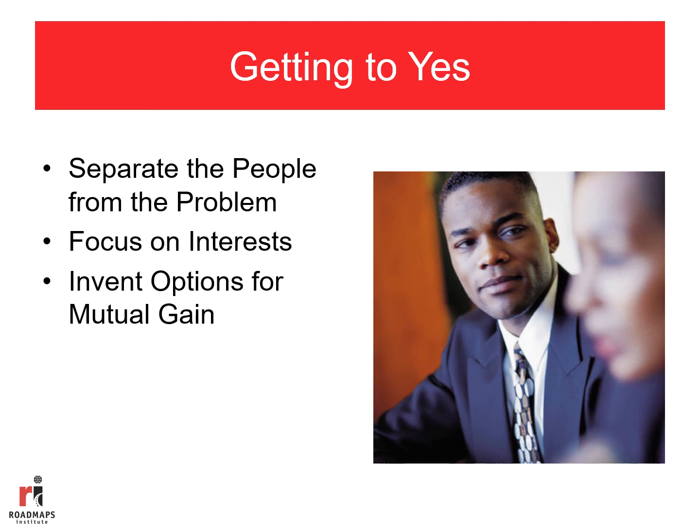In looking at the options for mutual gain, try to shift the discussions with respect to the project proposals and charts over to looking for ways that you can satisfy. For example, if somebody has a limited budget on a given project, maybe what you do is resource sharing instead of perhaps a price reduction or some sort of return on the investment coming back to you for that particular project.